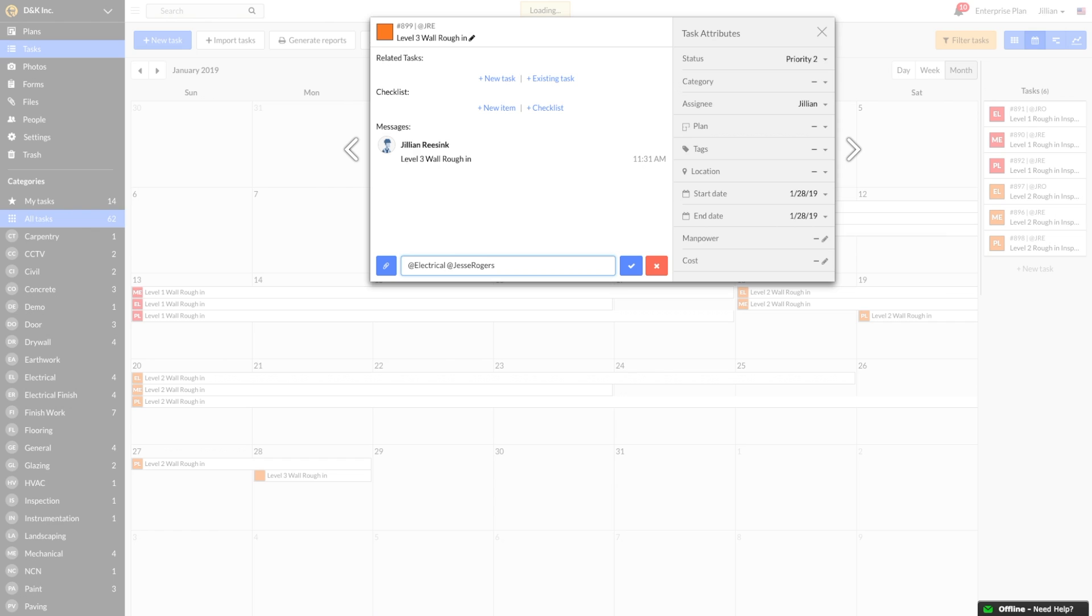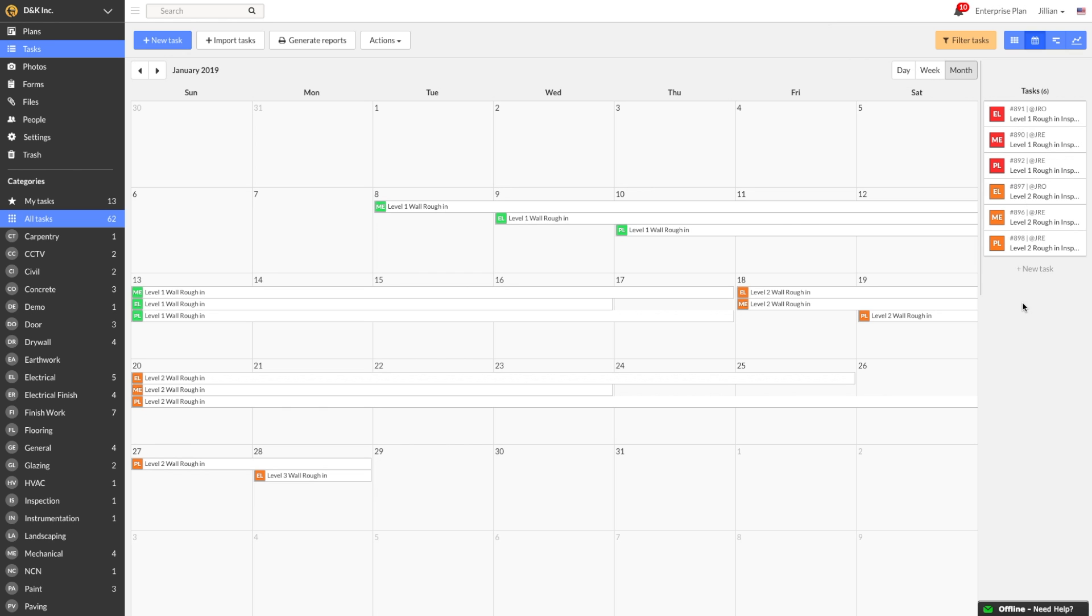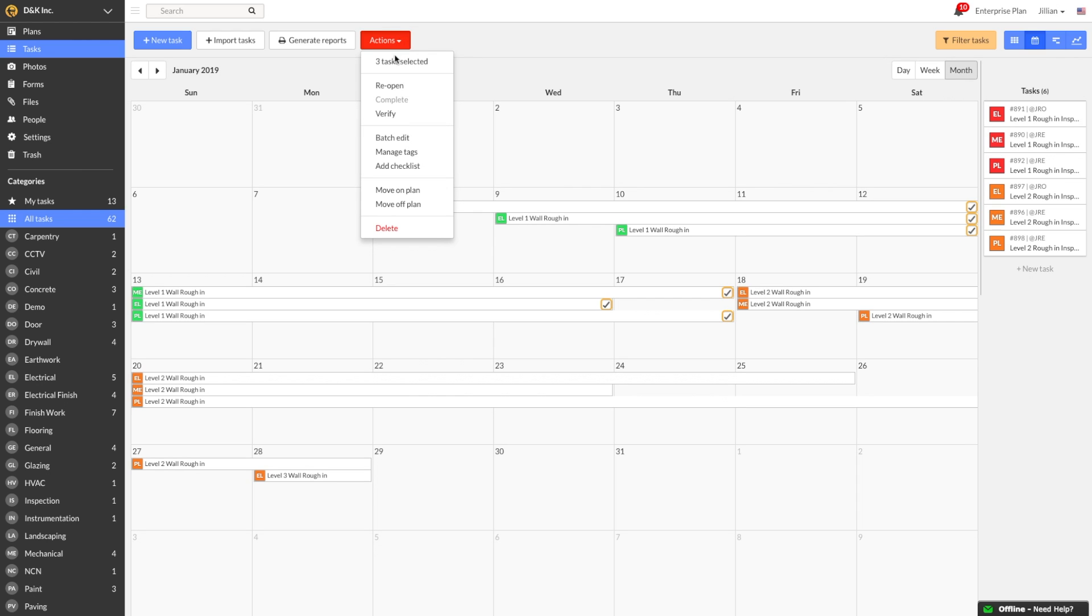Now, the task is assigned to them and we can start tracking the work. As my subs finish their rough-ins and complete the tasks, the tasks will turn green and I can then go do a quick quality control walkthrough. I can verify all the completed tasks by selecting them, then clicking on the Actions drop-down and marking them as verified. This way, I can ensure that all the trades rough-ins are not only complete, but completed correctly and ready for inspection.